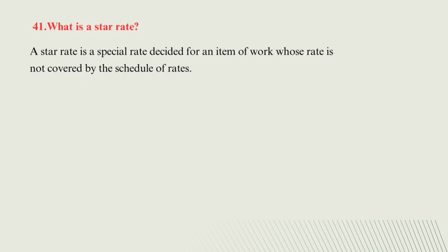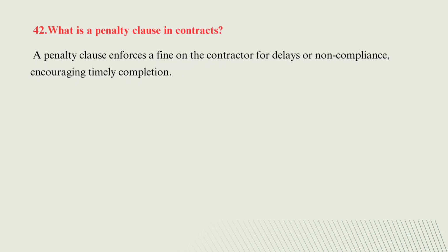A star rate is a special rate decided for an item of work whose rate is not covered by the schedule of rates. What is a penalty clause in contracts? A penalty clause enforces a fine on the contractor for the delay or non-compliance, encouraging timely completion.